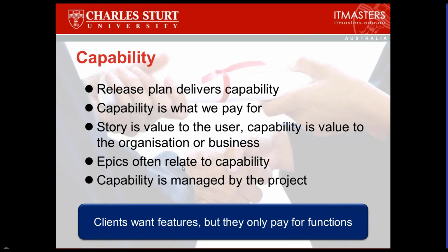What's the difference between the envision objectives and the release plan guidelines? So the envision objectives is what it needs to do. What are the outcomes that need to be achieved? The release planning is saying, well, if this is all of the outcomes that we need, what order are we going to do them in? How are we going to group them together? So it's the relationship between the things, the components of the vision.